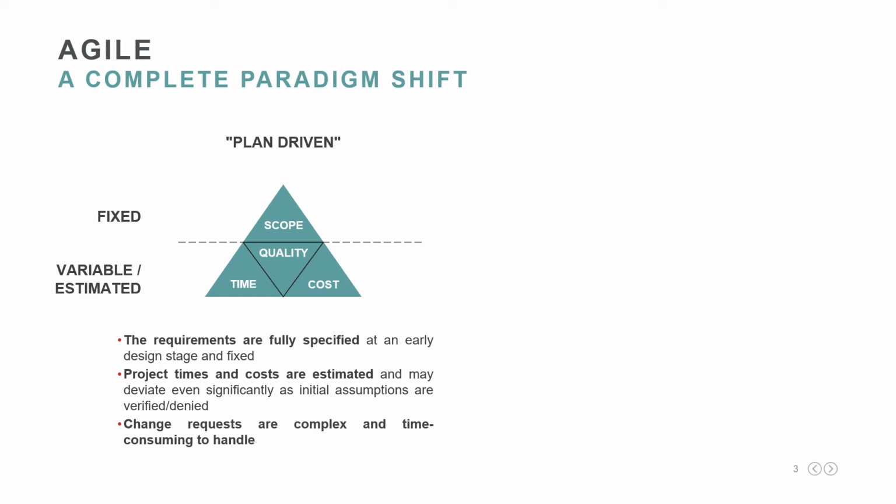Well, above the line there is the scope. Clearly, Waterfall requirements are fully specified at an early design stage and remain fixed for the rest of the project. In case of needed changes, change requests are complex and time-consuming to handle.